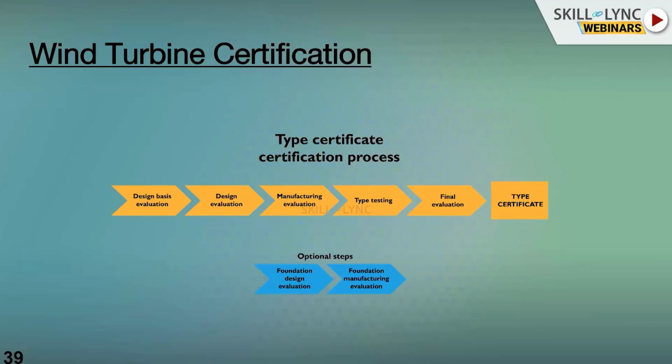They will do the power testing, power quality testing, and also noise level testing, and there is a list of various other tests. After doing all these tests, they go for a final evaluation, and after the final evaluation you will get the type certificate. It depends upon the country again. Only if you have the type certificate can you install anywhere in the world. In some countries, after the type certificate, you have to submit it to the government and get approval. Also, the local authority for those connecting to the grid requires you to submit the certification and get approval. Normally there are 3 stages of approval for a wind turbine to connect to the grid, before and after commissioning. The foundation is not included in the certification at present. If required, you can go for an additional evaluation for the foundation also. These are all the certification procedures.